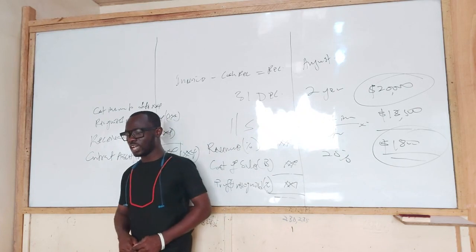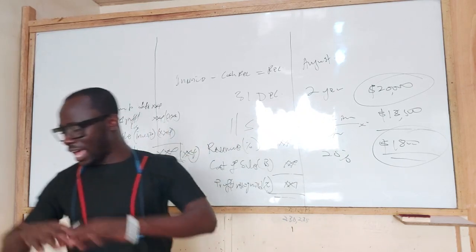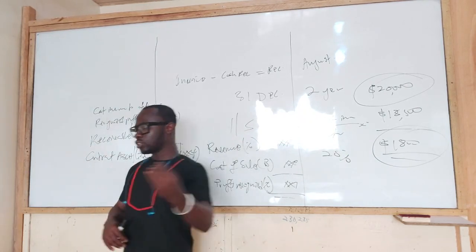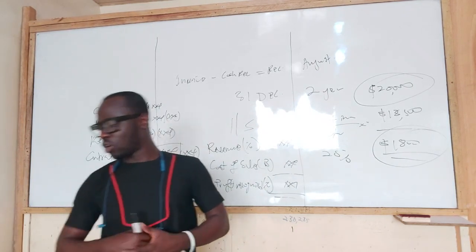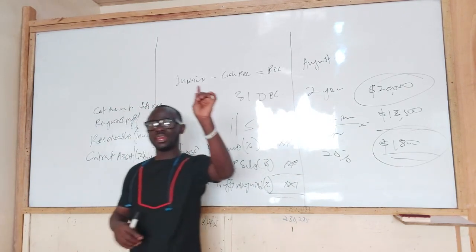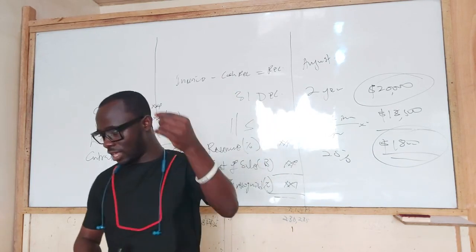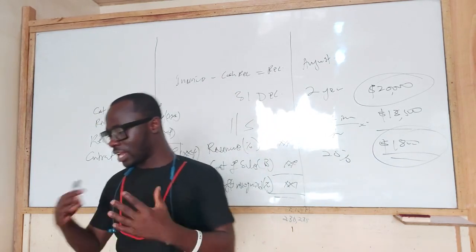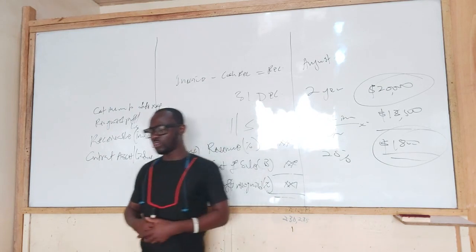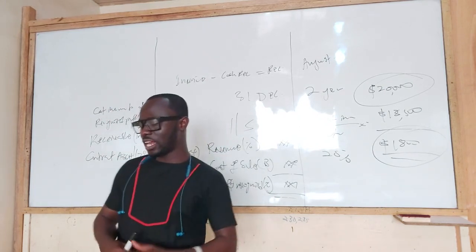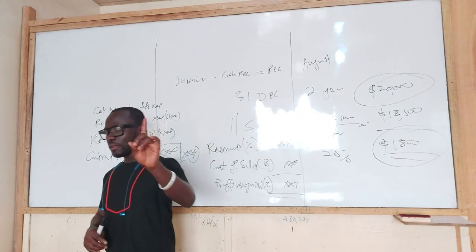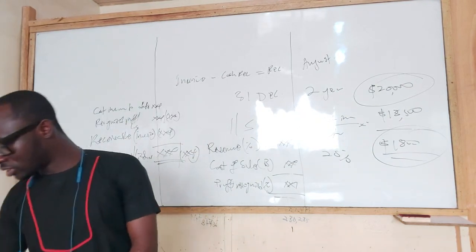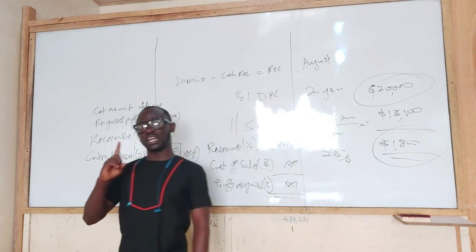Also, note that when a contract covers a number of assets, the construction of each asset should be treated as a separate construction contract when separate proposals have been submitted for each asset.